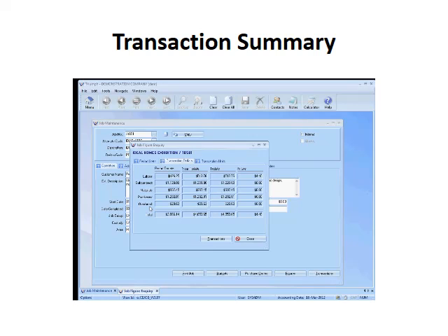Subcontracting always comes from purchase orders or invoices. Materials come from your inventory stock requisitions or from your point of sale job transactions. Purchases come from purchase orders and creditors invoices. Overheads always come through your overhead entry area.